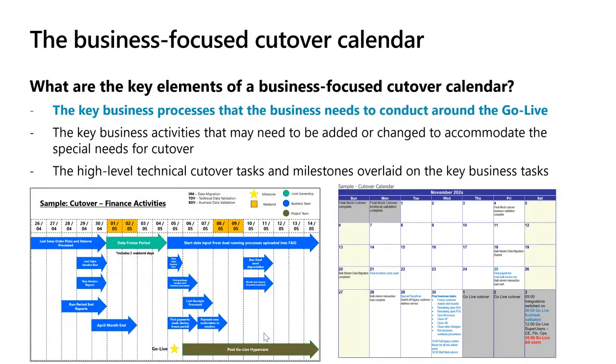And once you've got that high-level vision, you've got your business requirements defined, you've got some scope definition. This is still early days, right? You don't know all the answers to everything. You don't have all the details of the entity definitions, etc. This is still in the early days of the initiate, maybe just into starting implementation. And our recommendation is very early on, create a business-focused cutover calendar. And by that I mean, there's a couple of examples.